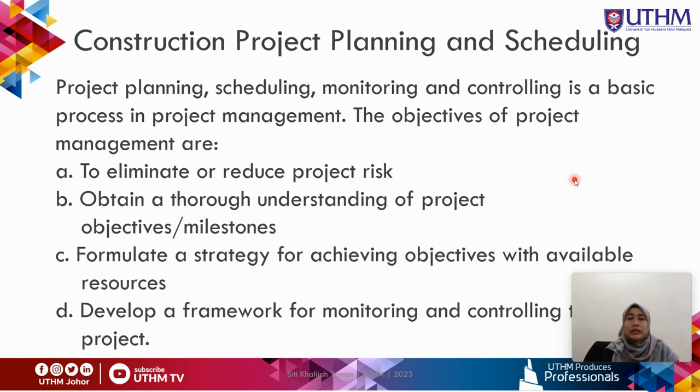Okay, so construction project planning and scheduling are two different things. Project planning means that you plan what are the activities or what are the tasks that are going to be involved in your construction project. But when we talk about scheduling, scheduling means that you put duration into every activity or every task involved in your project.